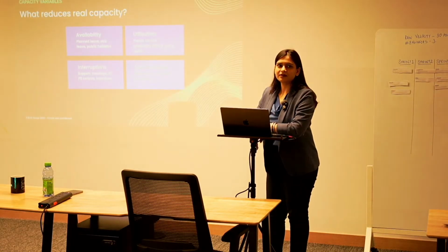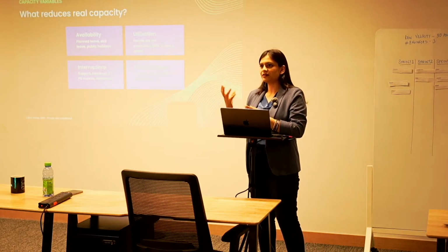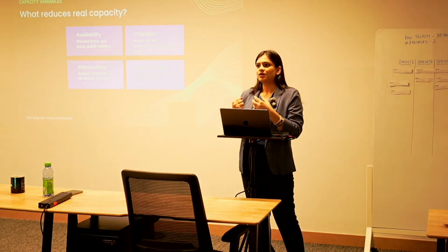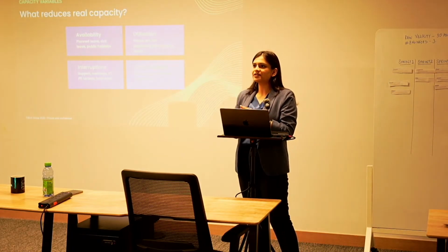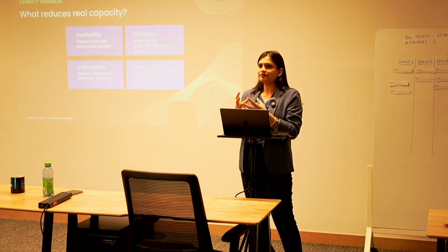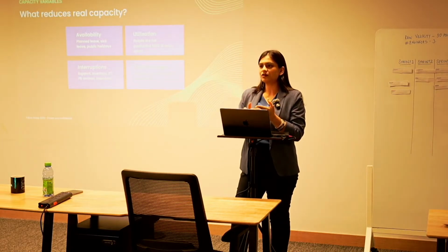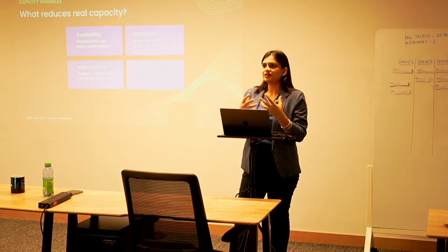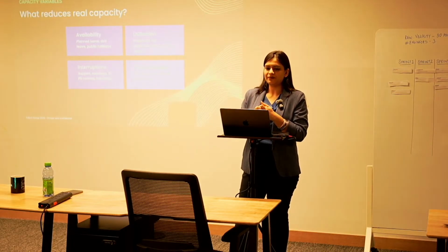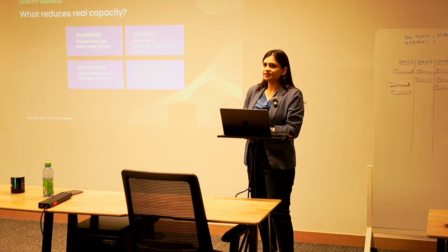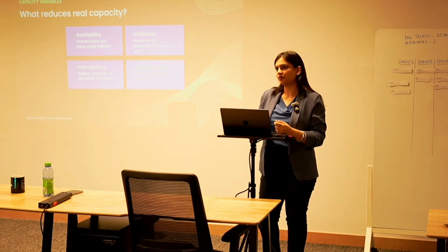Usually what we try to do is set up a base so that other developers, especially juniors who probably wouldn't be able to be up and running from day one if things are not set up, can get going. It's always good to have that infra, your repositories, your ways of working, all of that established, so that when they join in, things are already set up and they can just get on with the work and the stories that are assigned to them. So yeah, a gradual ramp up is always advised over the one time ramp up at the start of the project.